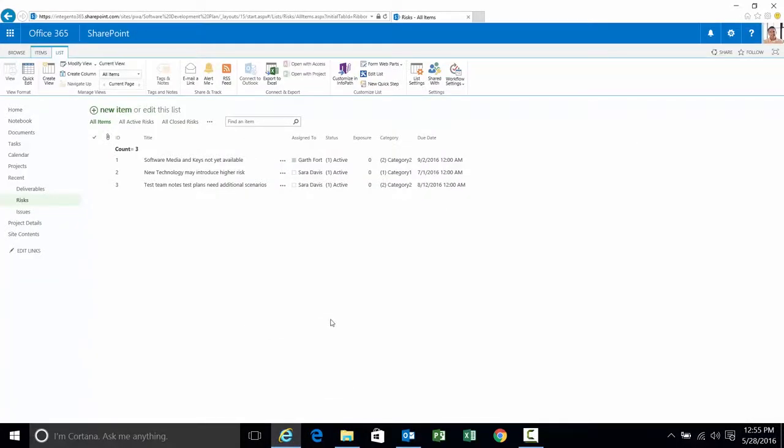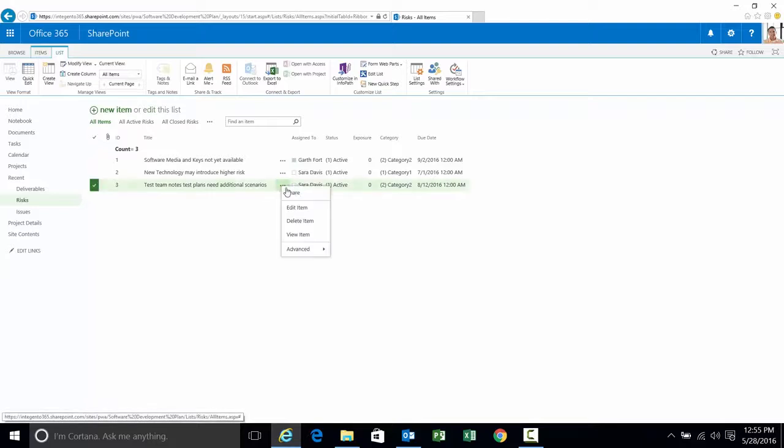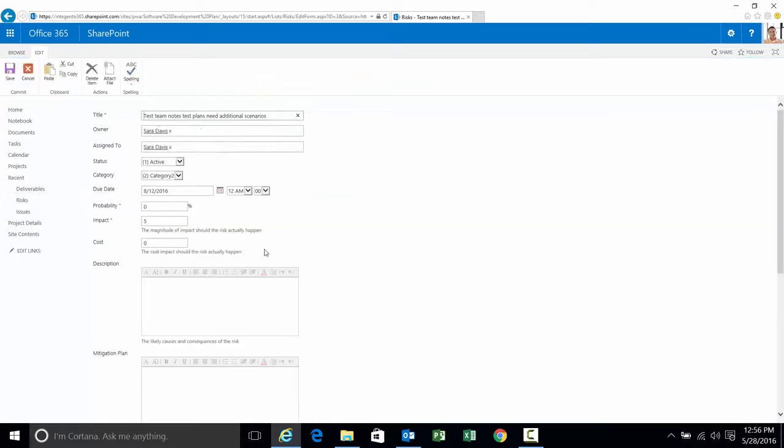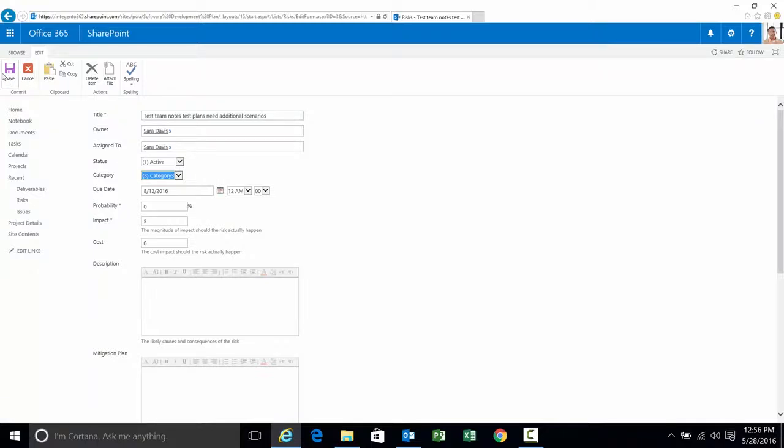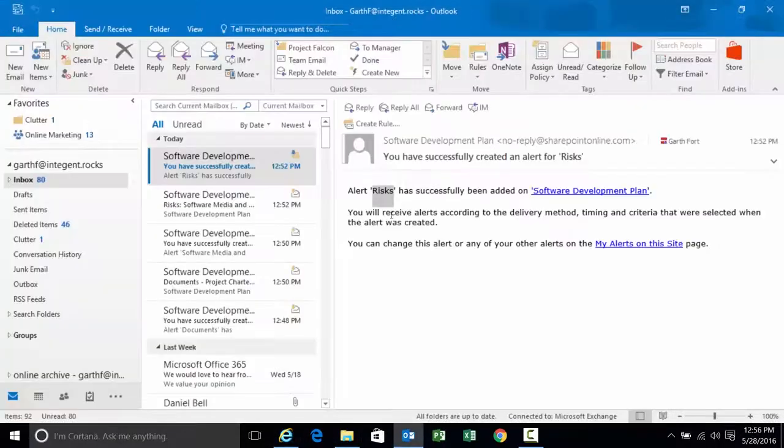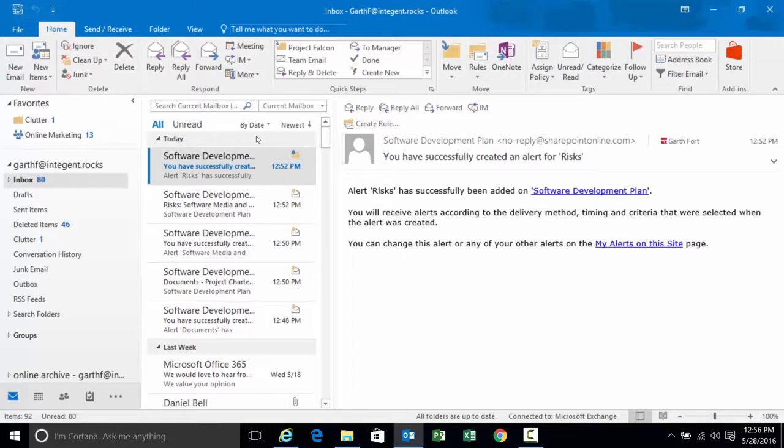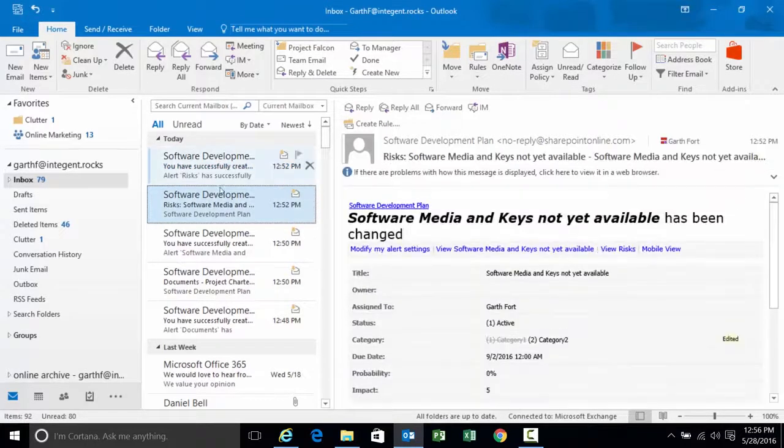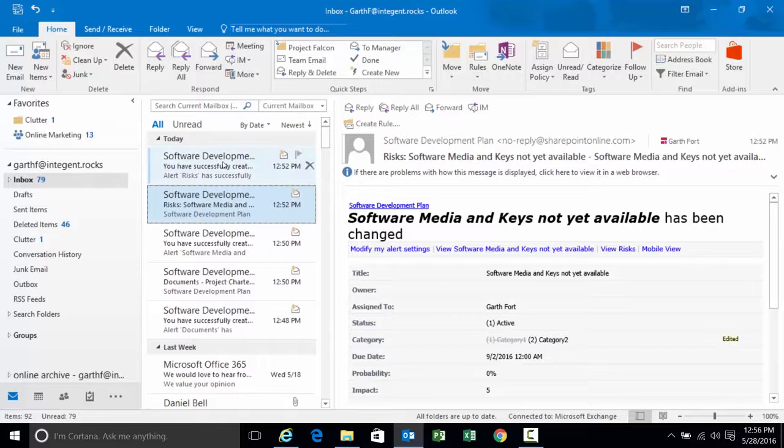Let's go back to the site one more time. Let's make a very simple change to the third risk. Team notes test plans need additional scenarios. Very simple change. Let's make it a category three. Save. We changed a risk that we didn't have a specific alert on. We just changed any risk in there. But since we set an alert at the list level we should still get a notification for that change.